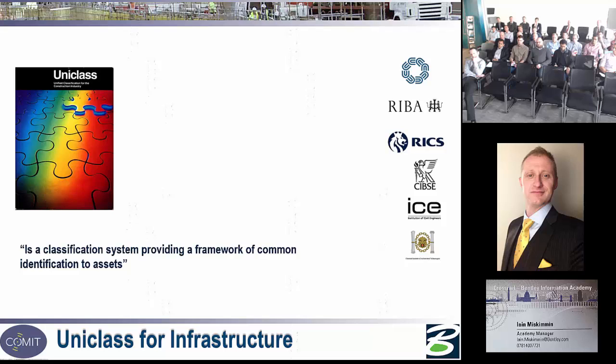When I say, right, count how many beams are in that building. Right, it's 20, great, let's order 20 beams. When actually there was another 5 called steel somewhere in the system.